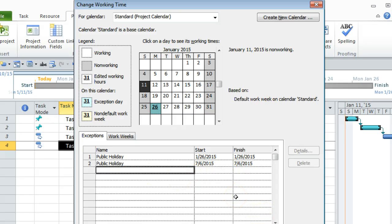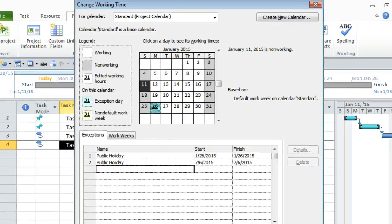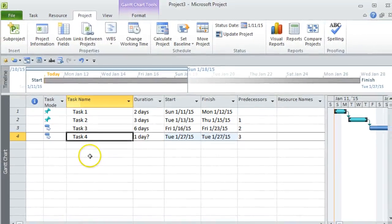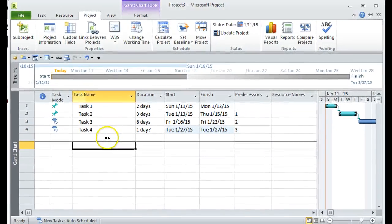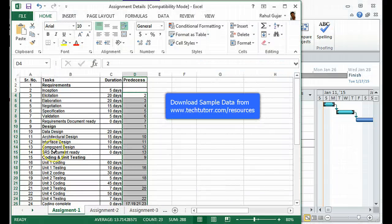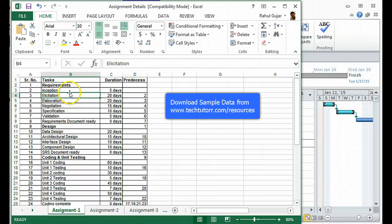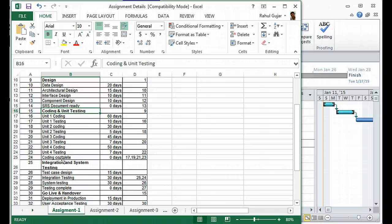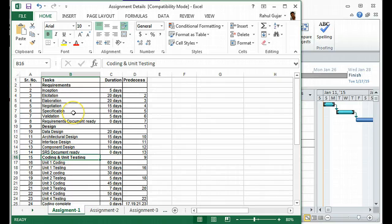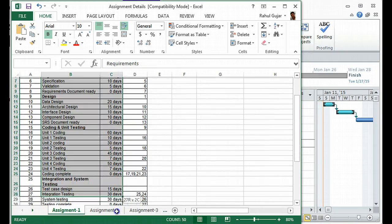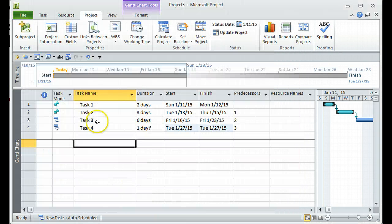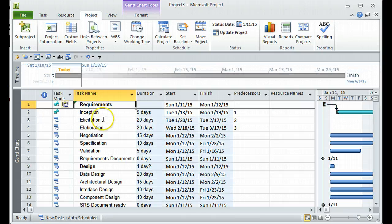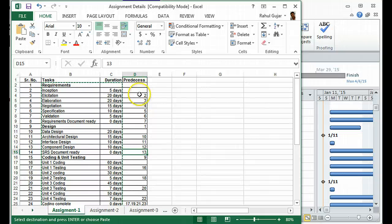That's how you add holidays upfront. In later tutorials I'll also show how to add holidays for a particular resource and task-based exceptions. Now I'd also like to show the sample data I'll be using for the rest of the tutorial series. I've taken an IT project as the baseline — it has different phases like requirements, design, coding, unit testing, integration, and so on. I'm going to quickly copy and paste this data including the predecessors.